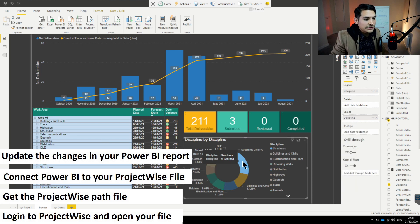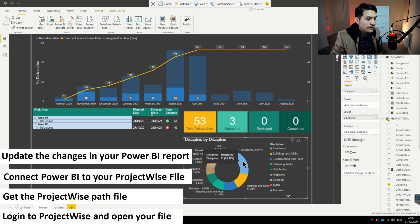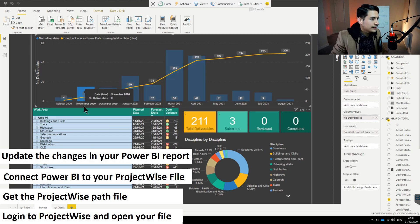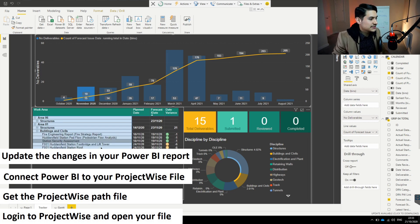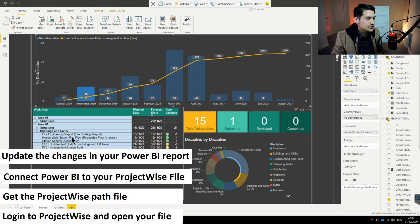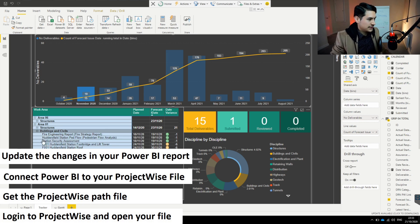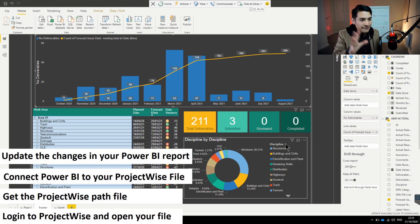You can filter to show only structures documentation and see it spread out over time. You can also navigate and hover over a specific month — for example, clicking November filters which specific documents I need to deliver that month to meet my baseline. I can see that for buildings and civils I have several documents to provide by November and I'm already a little delayed on some of them, so I need to catch up and communicate that to the lead designers.